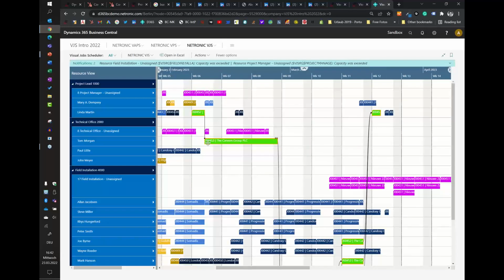You saw that we can also facilitate such a case where we say, okay, Tom has 16 hours budget for this, but he has 15 days time to complete this task. And if this resource would be an employee and we would have an absence for this employee, then this would also be shown.